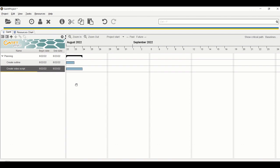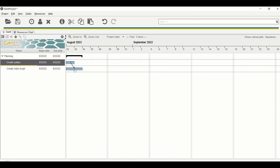The most common type of task relationship is Finish-to-Start, meaning Task B can only start after Task A is done. For example, 'Create Video Script' should begin after 'Create Outline' is finished. To add a relationship, hover over the first task, drag and hold the mouse, and point it to the second task. The default relationship type is Finish-to-Start.